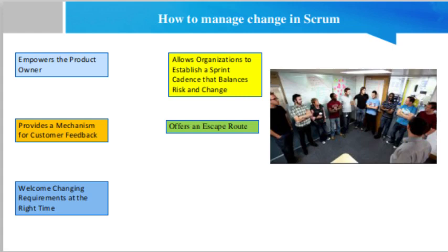If a product owner finds stakeholders demonstrating behavior disruptive to the Scrum team, such as demanding that the team swap similarly sized stories or add just this one thing to the sprint, they can push back by asking, is this change so valuable that it's worth the enormous cost of cancelling and replanning the sprint? If it is not, then it can go into the backlog to be prioritized.